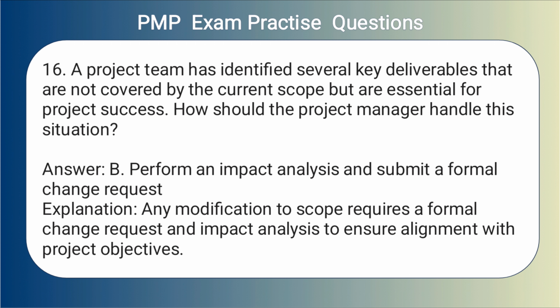Answer: B. Perform an impact analysis and submit a formal change request. Explanation: Any modification to scope requires a formal change request and impact analysis to ensure alignment with project objectives.